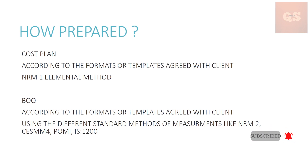Now, how are both these prepared? There might be some formats or templates already existing in the company or provided by the client, and based on that they can be prepared. Alternatively, there are international standard methods of measurement. For example, NRM1 is used to prepare a cost plan using the elemental method — I have explained this in the cost plan video. For BOQ, different standard methods of measurement are available, such as NRM2, SMM4, POMI, and for Indian projects IS 1200.